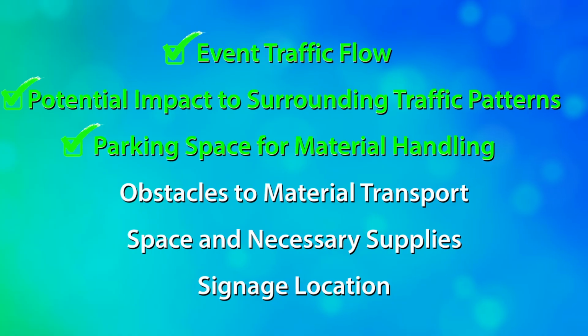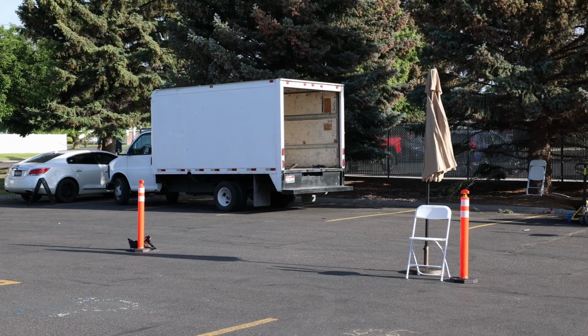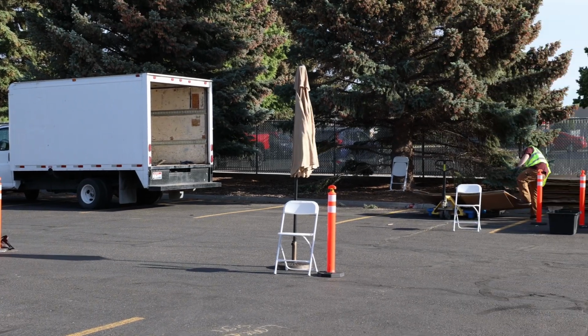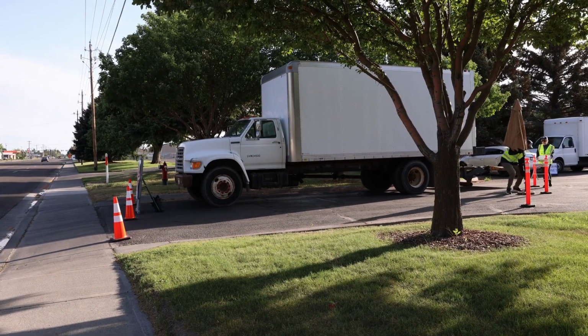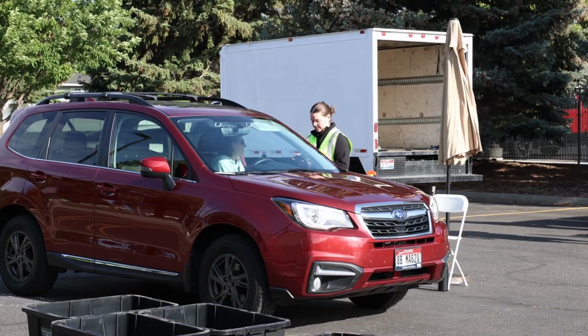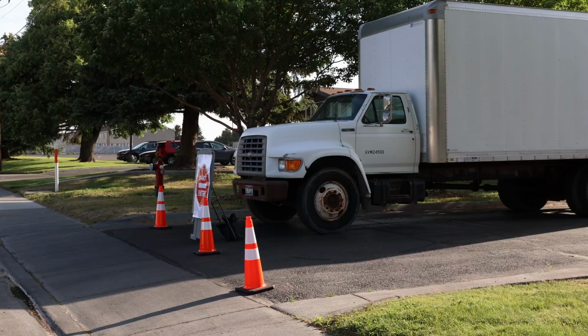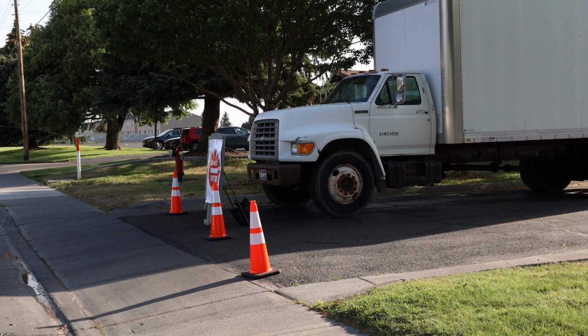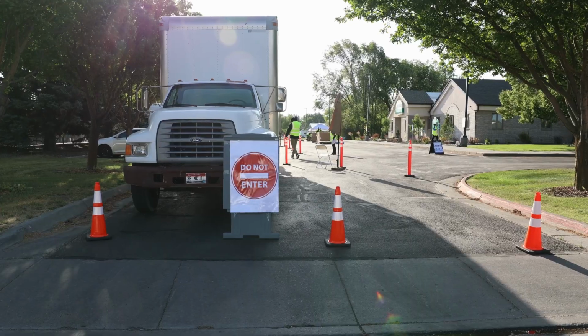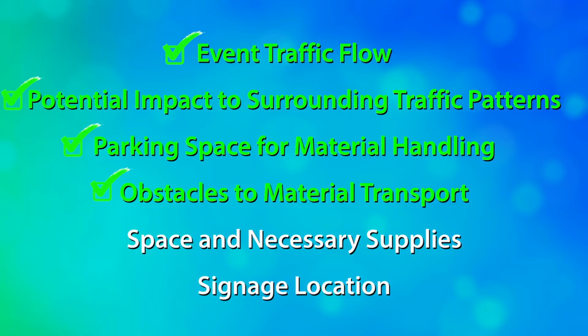Parking space for material handling. Material handling trucks should have their own parking spot to easily load and unload materials. Their parking spaces should be close to the lot's exits and separate from inflow and outflow traffic. You might want to block the parking lot entrance where the truck is parking with traffic cones and put up "Do Not Enter" signs.